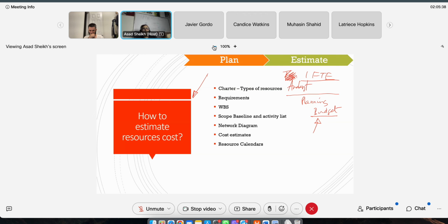Who is this person? If it turns out this person is not available and you have to go outside to get a contractor, which happens, then you need to figure out the contractor's hourly rate. Then you take that hourly rate, let's say it's $50 an hour. Once you know that, you can multiply that by 40 because you said it's going to be one FTE. Then you'll get the dollar amount per week. Multiply by 4 per month, multiply by 3 months for that amount.